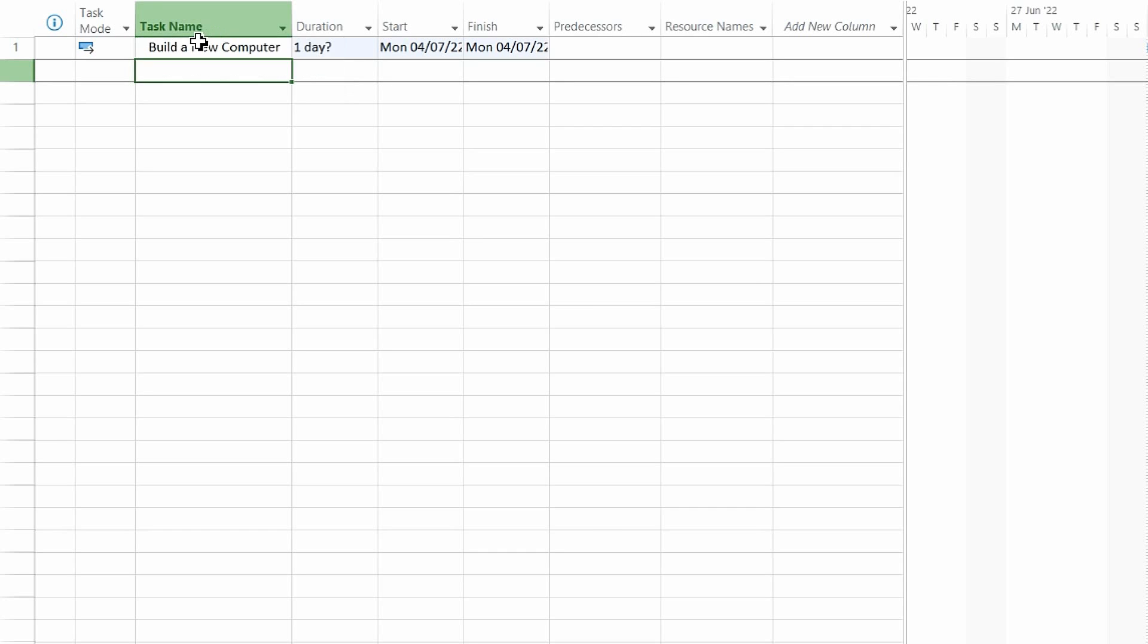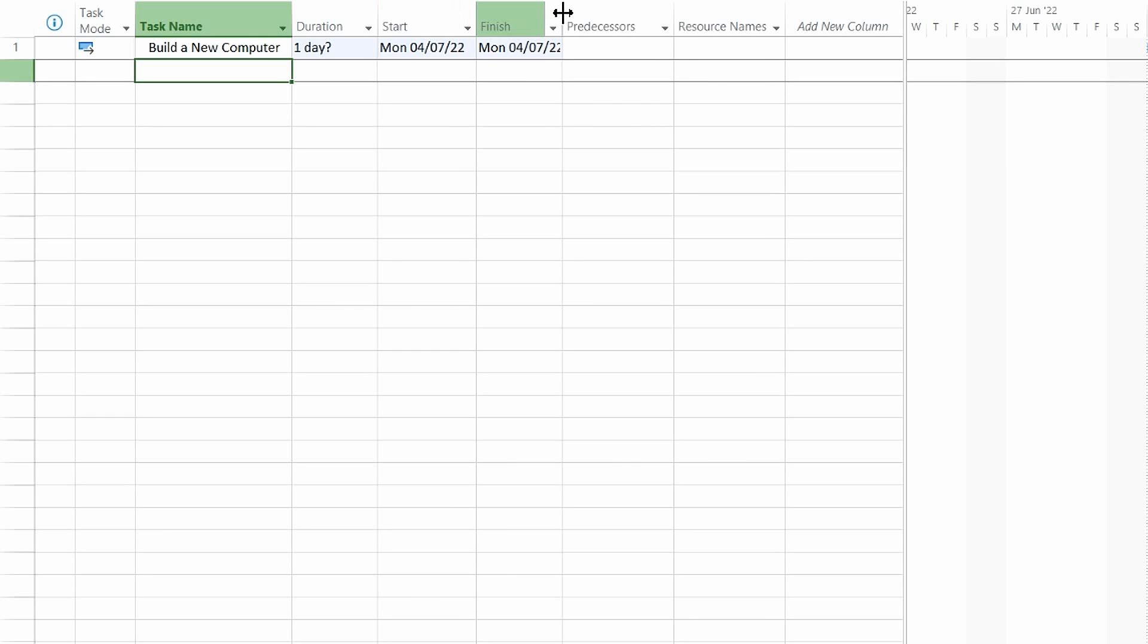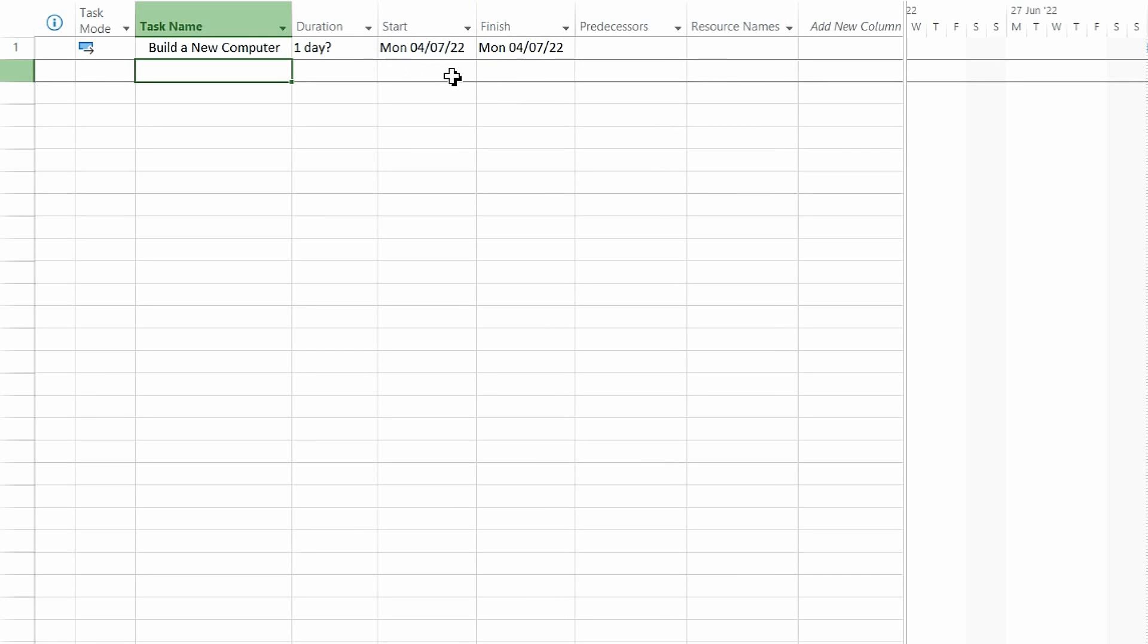As you can see, a default duration has been created along with a start and finish date. Now if we hadn't entered a start date within the project information, the date would have defaulted to your system date of the computer, i.e., today's date. However, because we've set the project start date in the project information, it has defaulted to that date, the 4th of July. Now if any of these rows or columns are not visible, like anything else in Microsoft, you can double-click to expand and reveal the contents within them.